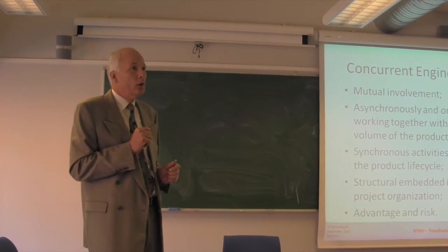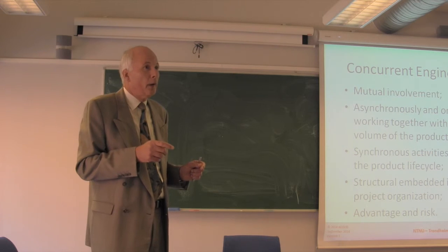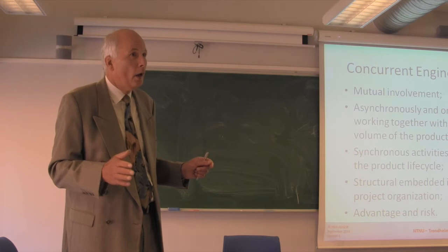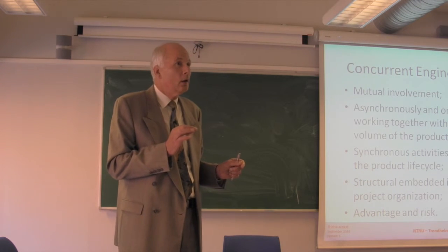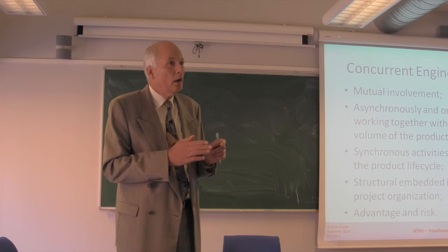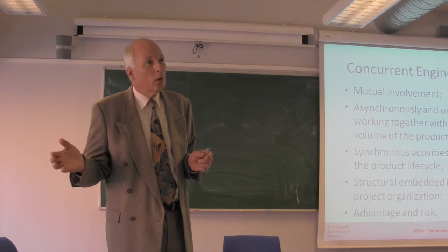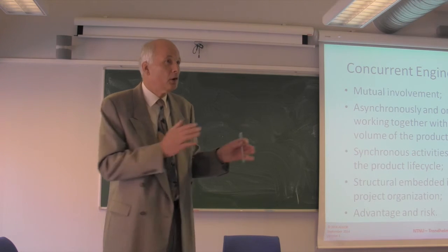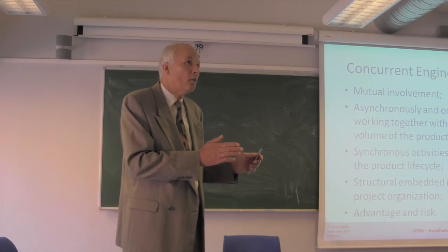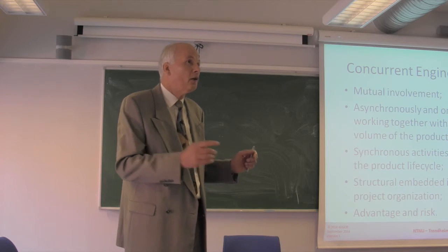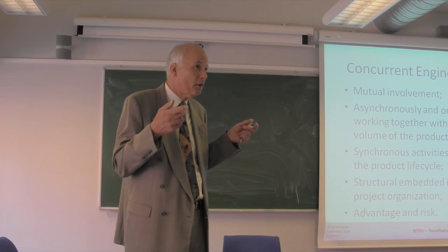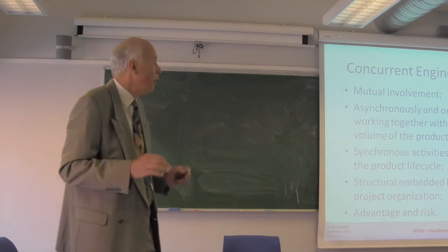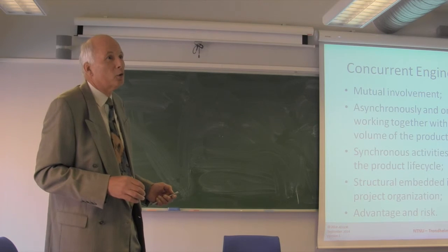Now this is not the real thing. What should have happened is that it should be known by the program management that it takes so many months to get this tool, and they should weigh the risk. What should we do? Order the tool or wait a little bit longer? And the risk was not for manufacturing, the risk was from the budget of the program or project. They should have thought about risk, they should have taken the risk or not. And only if it is in that way, I call it concurrent engineering.